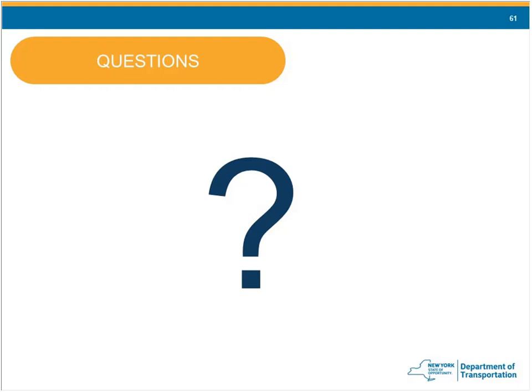Are there any scenarios where a $0 change order needs OSC approval? Yes. If you truly had a change order, and again, this goes back to the first few slides of what requires a change order, warranty, paving, any changes to the contract values other than through FCP. A change order is a change to your contract.